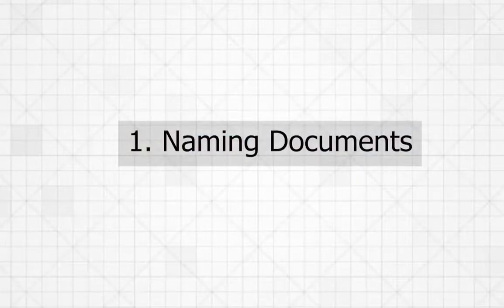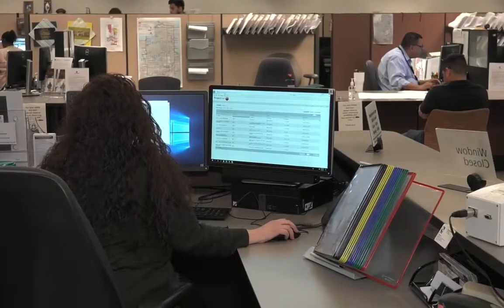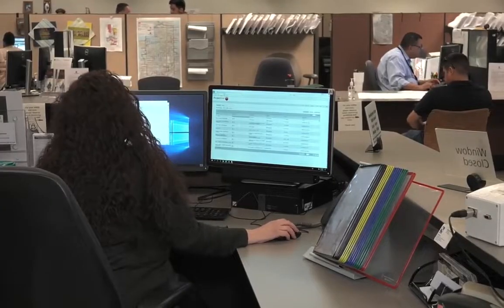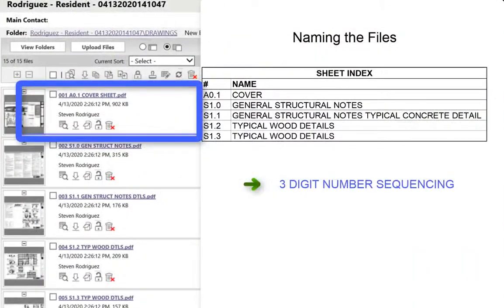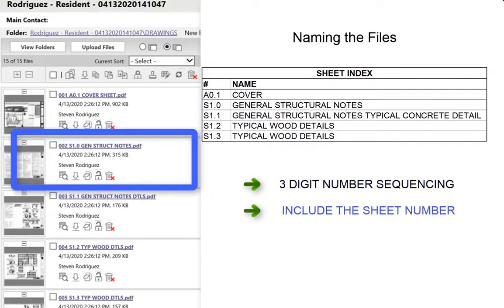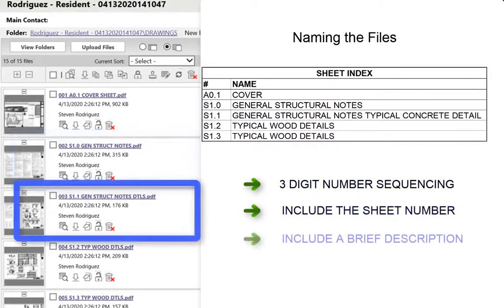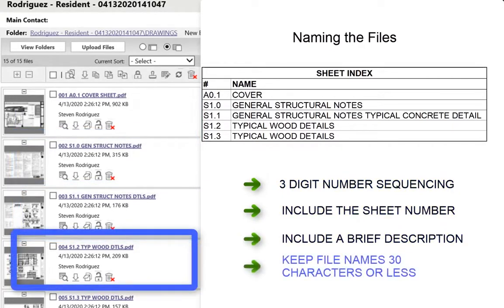First, naming the documents. Customers often do not follow the naming protocols for EPR, which makes it harder for the reviewer to find some of the documents in the submittal. Use three digits starting from 001, starting with the cover sheet, and continue to name the documents in numerical order. Include the sheet number and include a brief sheet description. Make sure the names are 30 characters or less.